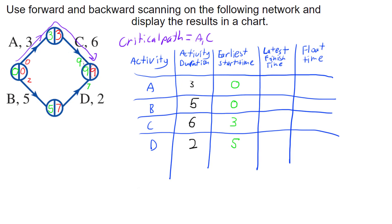The latest finish times come from the backward scanning — specifically the node to the right of each arc. The latest I can finish A is at minute three. The latest I can finish B is minute seven, because we had two minutes spare and can delay B — I can start at minute zero but finish as late as minute seven, even though B only takes five minutes. C must finish at minute nine, and D must also finish at minute nine, as both must be done by the end of the project.